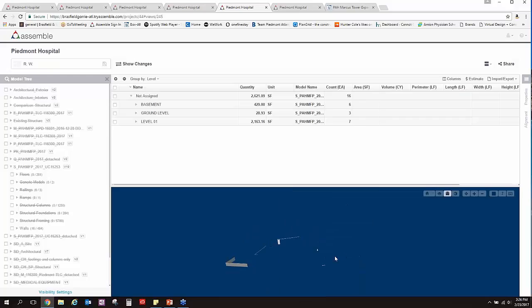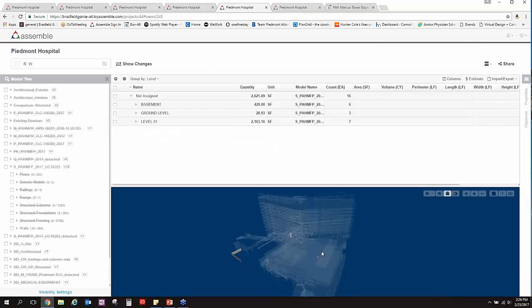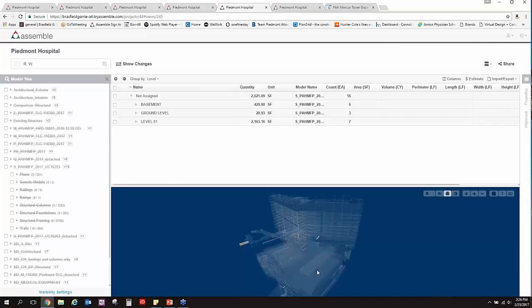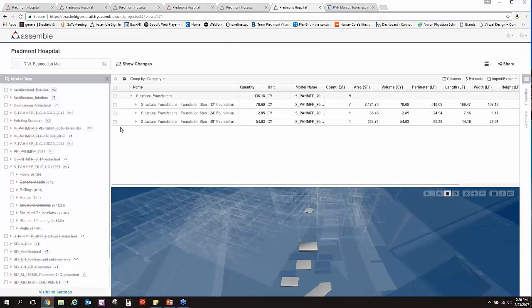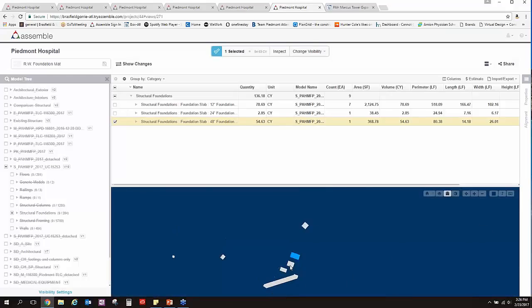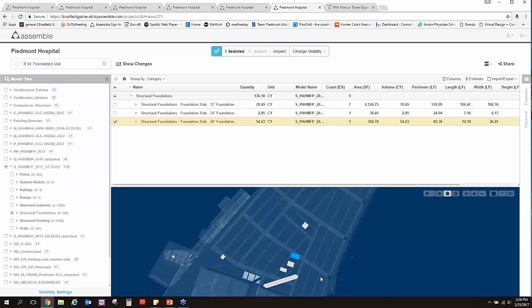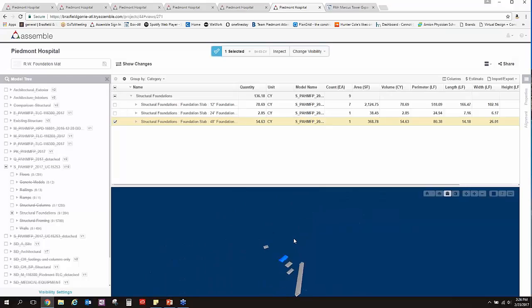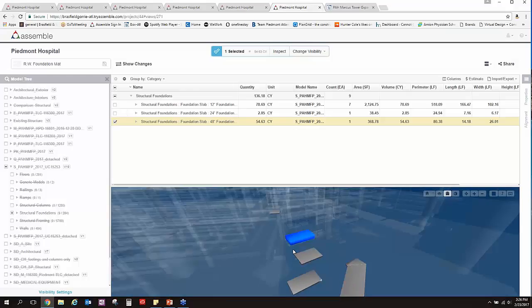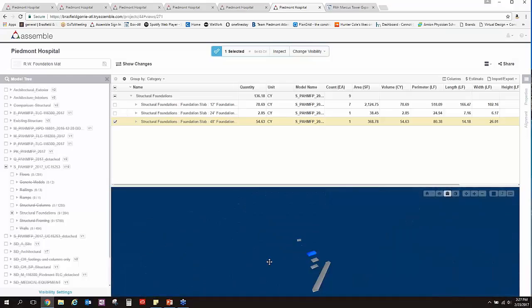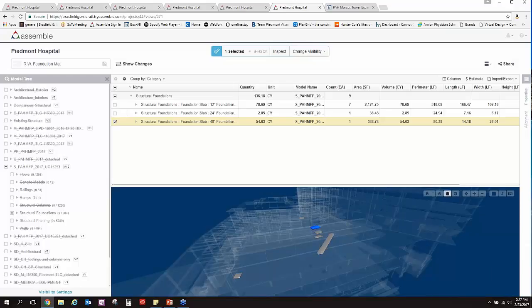This is how we start to generate a model RFI log — we're associating a view and an Assemble snapshot with the question so we can go through these with the engineer on a call and understand what these walls are. Another example was one of the mat foundation slabs on the job. From a 2D standpoint, these foundation slabs looked to be about the same, and only one was noted — it was labeled as a 12-inch foundation. But upon opening the model, we were able to see that there are actually three sizes, and especially one is a 48-inch foundation slab. Getting that kind of information early on, especially at our SD and DD rounds, really helps us understand and make sure that our estimate is complete.